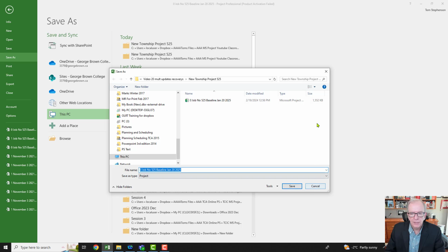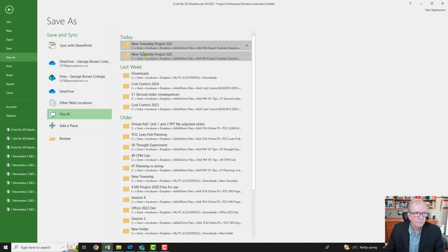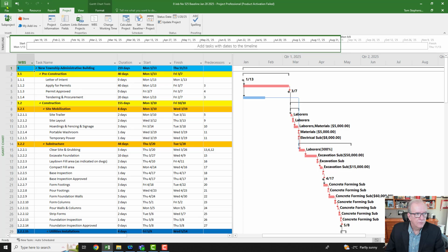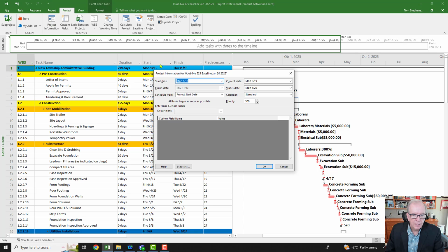So let's try that. I'm just going to cancel this out seeing I've already saved it. And I'll just go back here. I'm just going to click Save again so we know where we're at. And so what I'm going to do is update this to a status date. I've written a few status dates down here so we can just quickly run through this. And I'm going to go into my project information, and I'm going to select status date. And remember, status date is the date you're updating the project to. So I'm going to go into 2025 and I'm going to put March 6th. And that's my status date, 2025, March 6th.